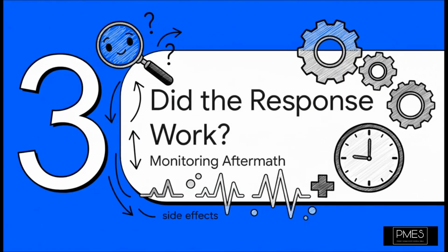Okay, so the risk owner has stepped up, the response is in motion, we're all good, right? Project saved, time to move on? Well, not quite. The next step, and it's a huge one, is to monitor the aftermath. Because, a lot like in medicine, sometimes even the perfect treatment can have some unexpected side effects.